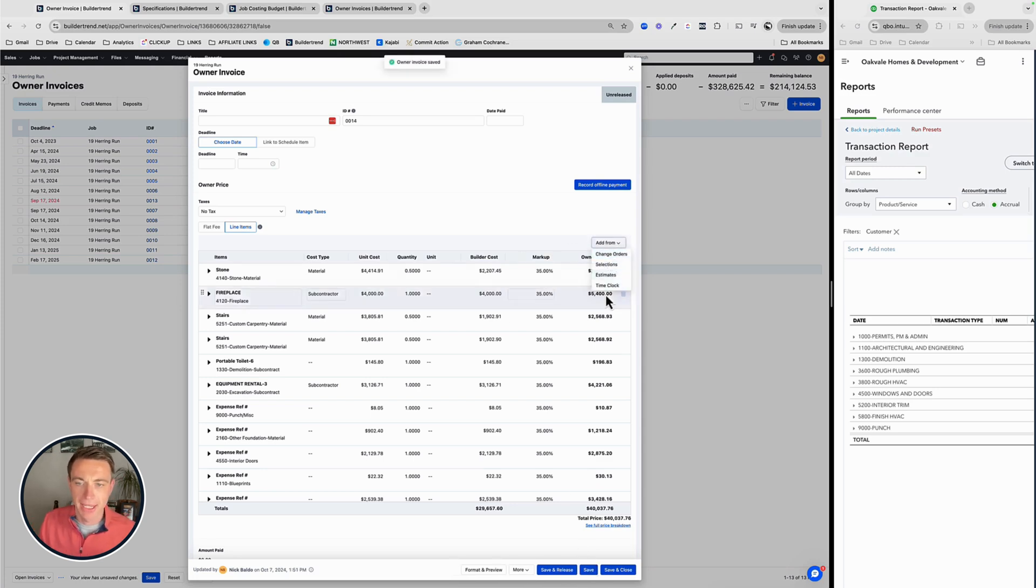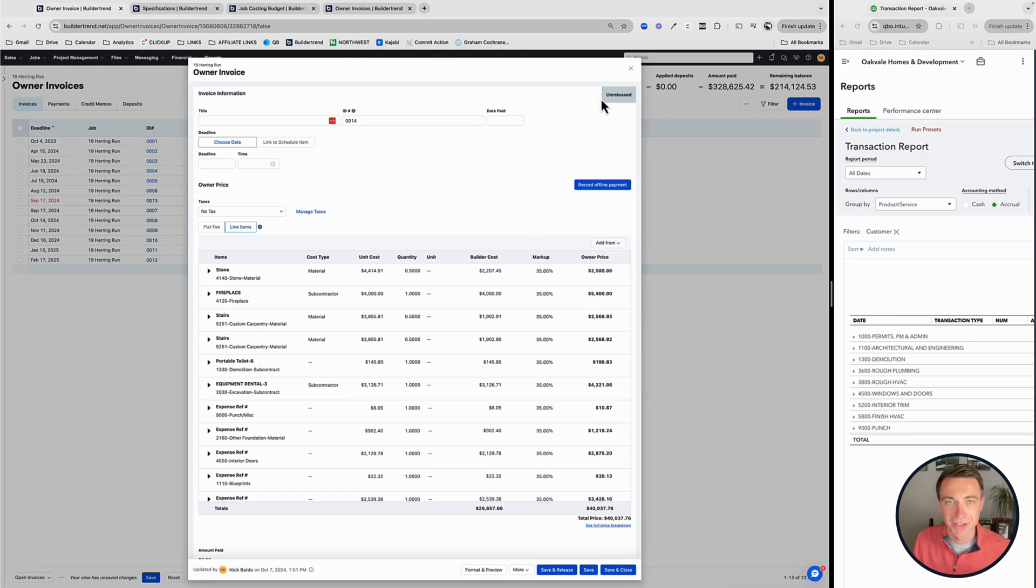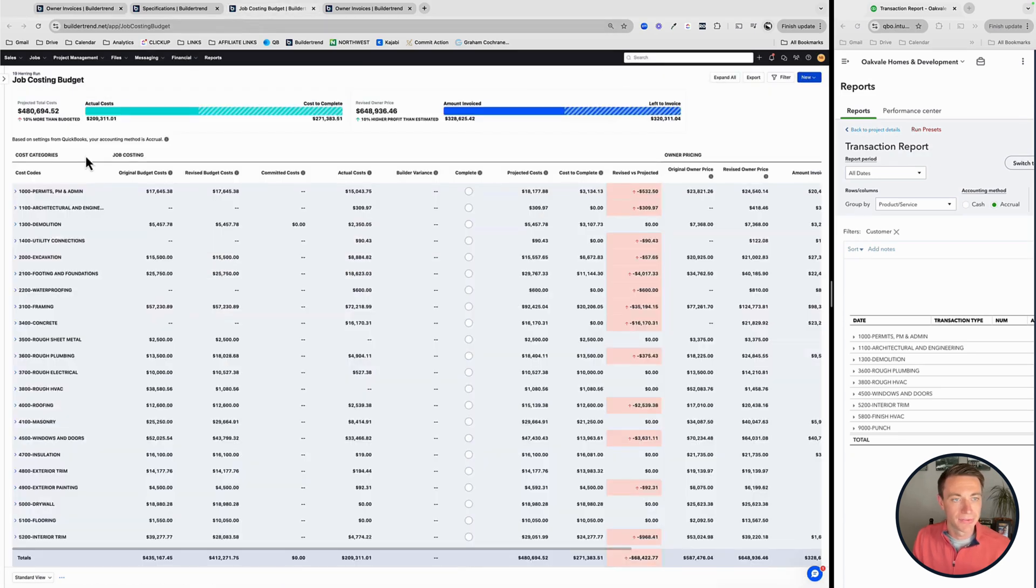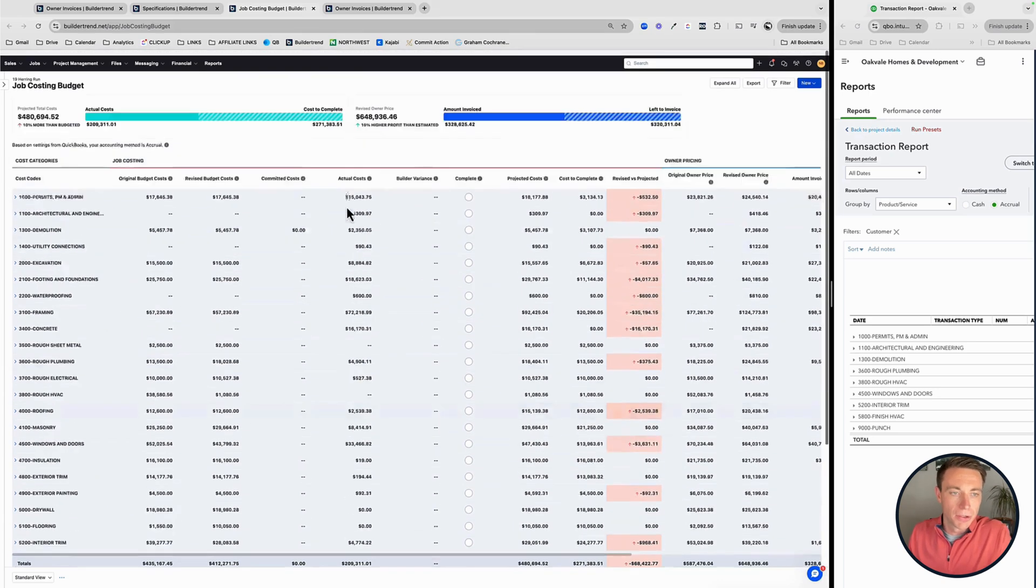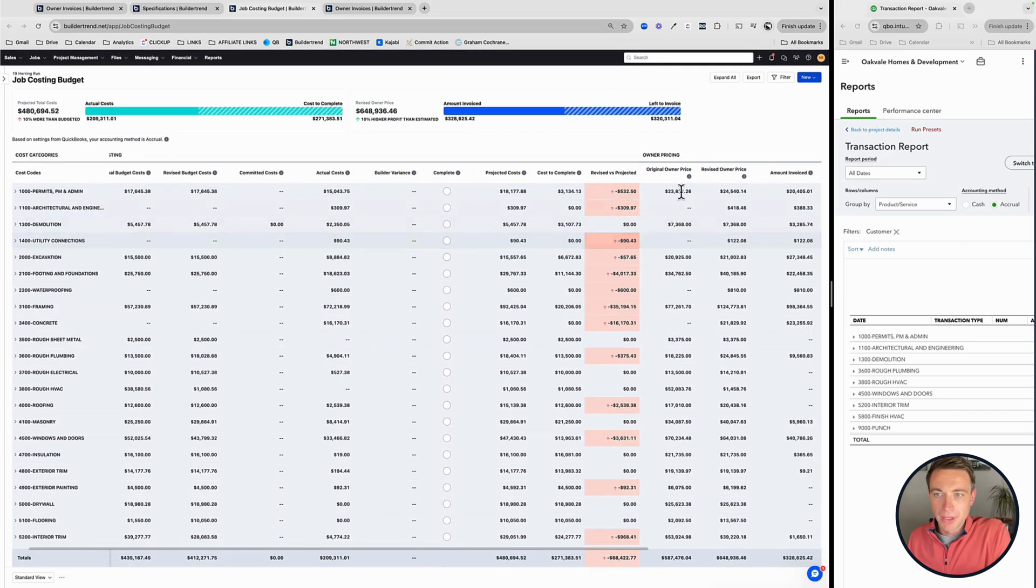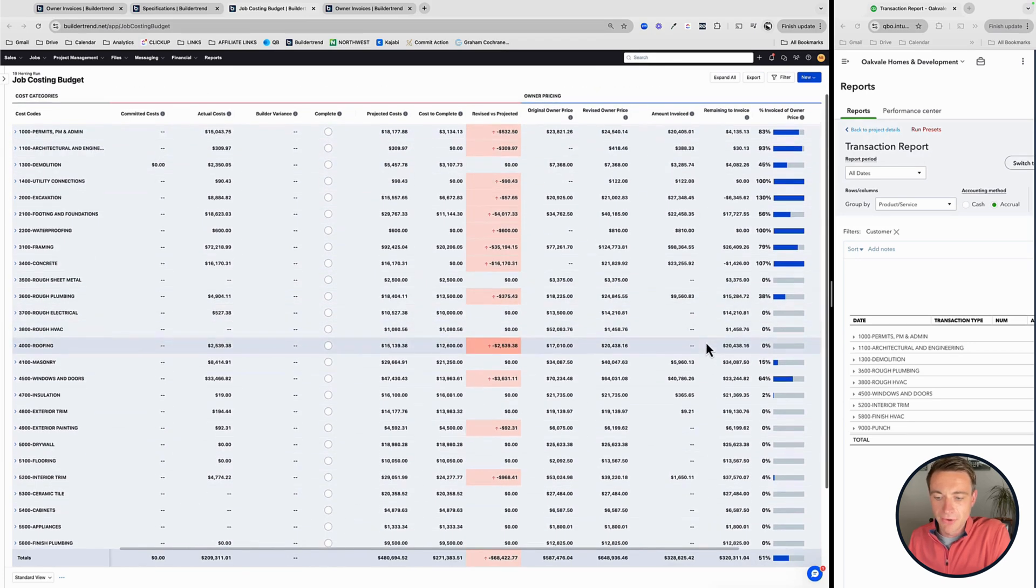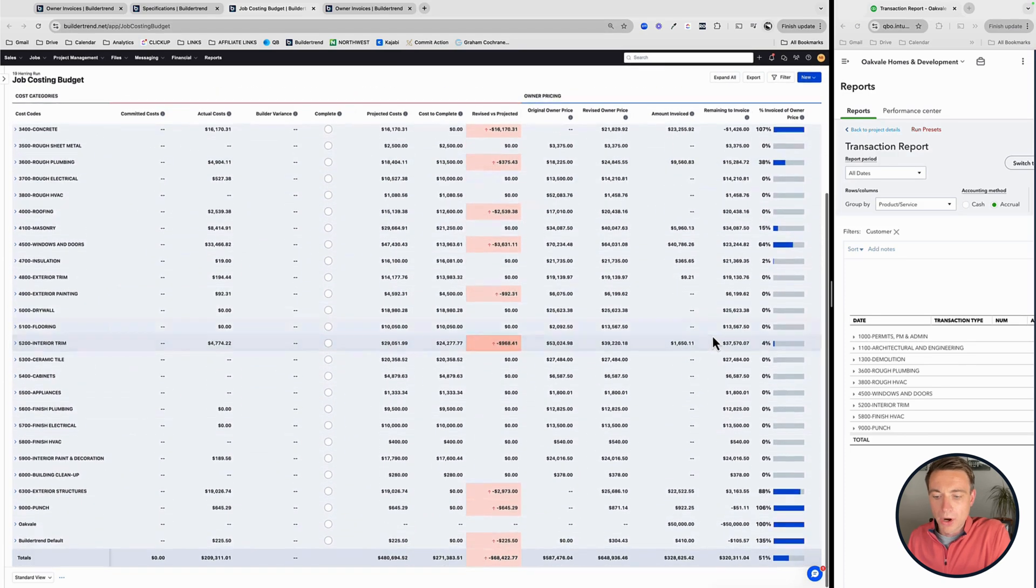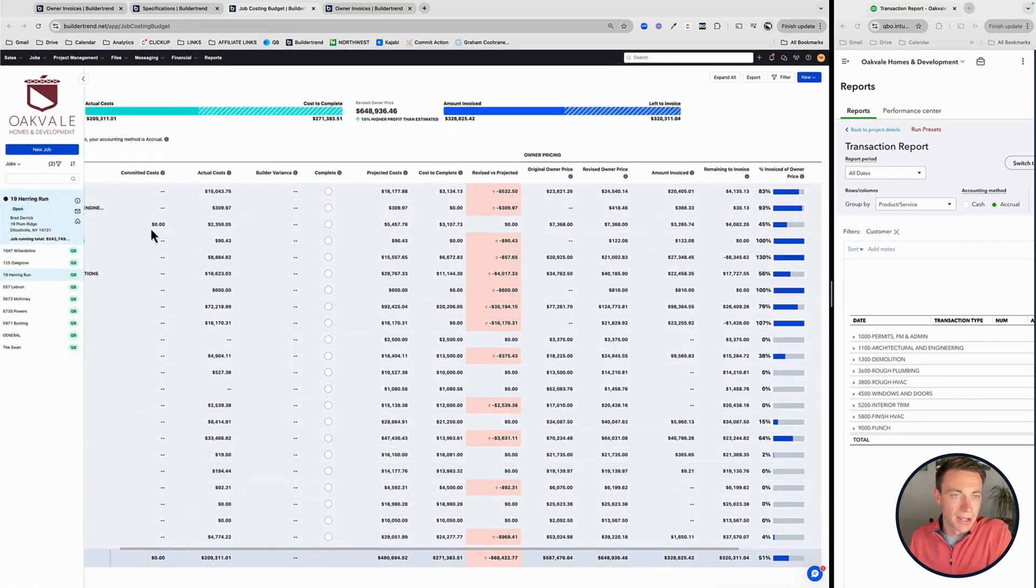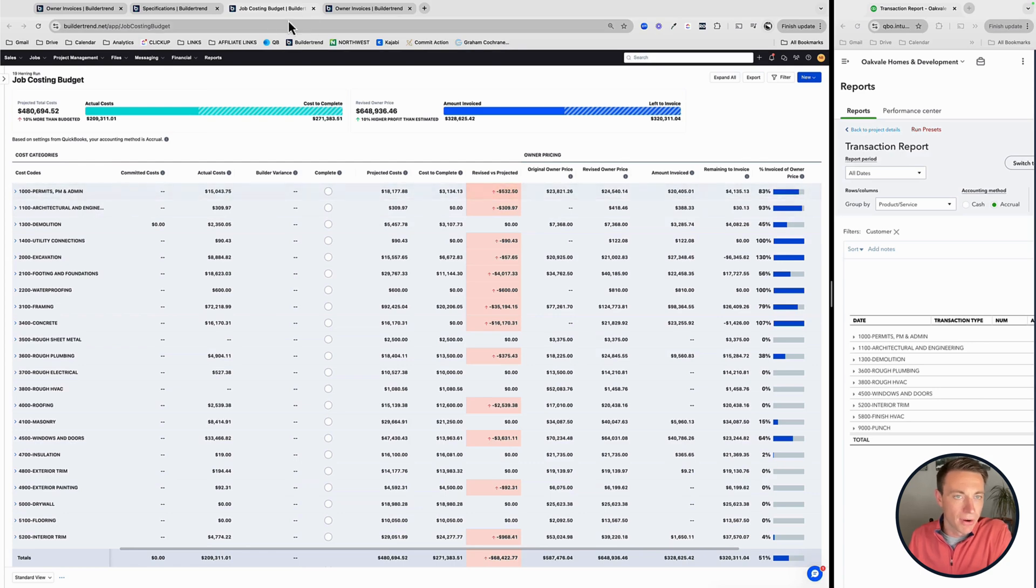Now I'm going to add from the time clock in a second. I'm not going to use this project because this is a real live project with real live human beings. And I don't want to publish their names and hours and rates and everything on the internet. So what I'm going to do is I'm going to go to a different one over here. Actually before I do, it's over here. I just want to show you the job costing, what we can do with this. The reason it's so valuable is when we mark items as billable, it helps us to indicate an amount invoice versus our revised. So remaining to invoice could potentially help the customer understand where we're at when it comes to how much more to expect. Now you have to have your job costing and your estimate really locked in for that, which is a topic for another video.